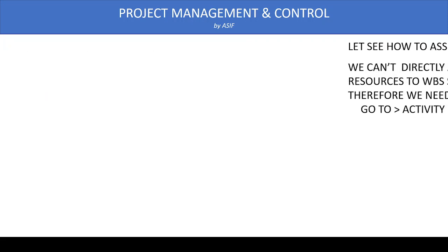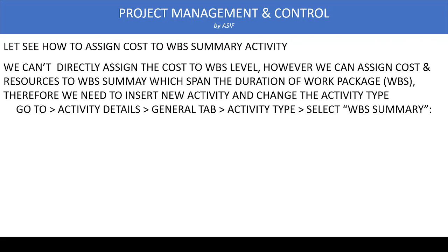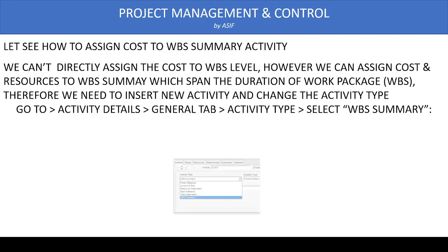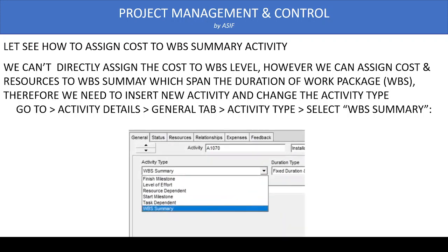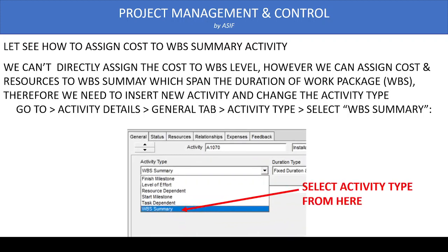So first, we need to assign WBS to start with WBS Summary activity. We need to assign a single activity as normal way and then we go in the general tab and change the activity type from task dependent to the WBS Summary level.